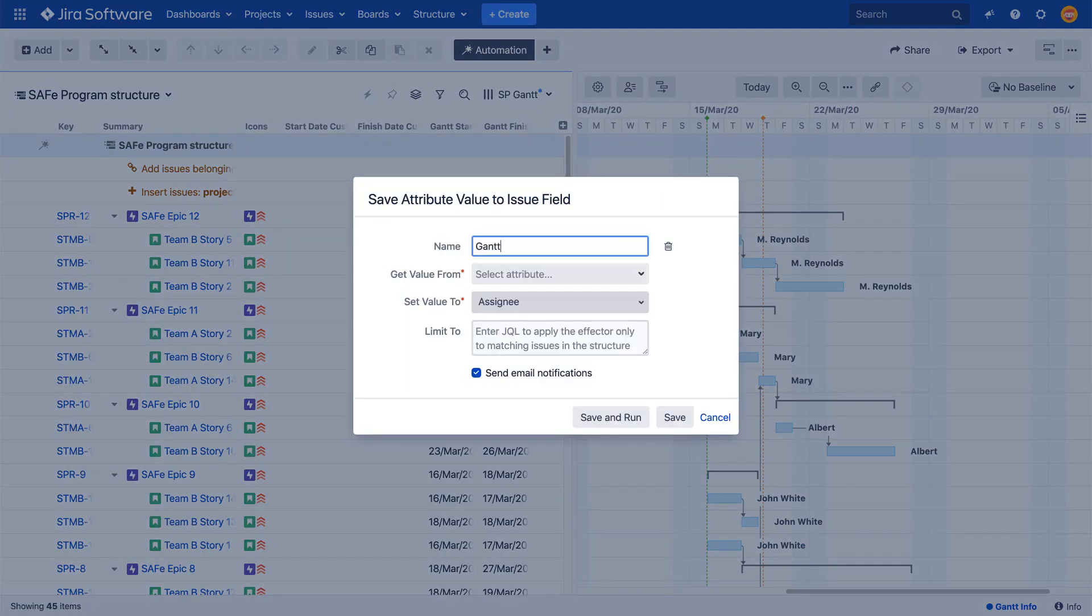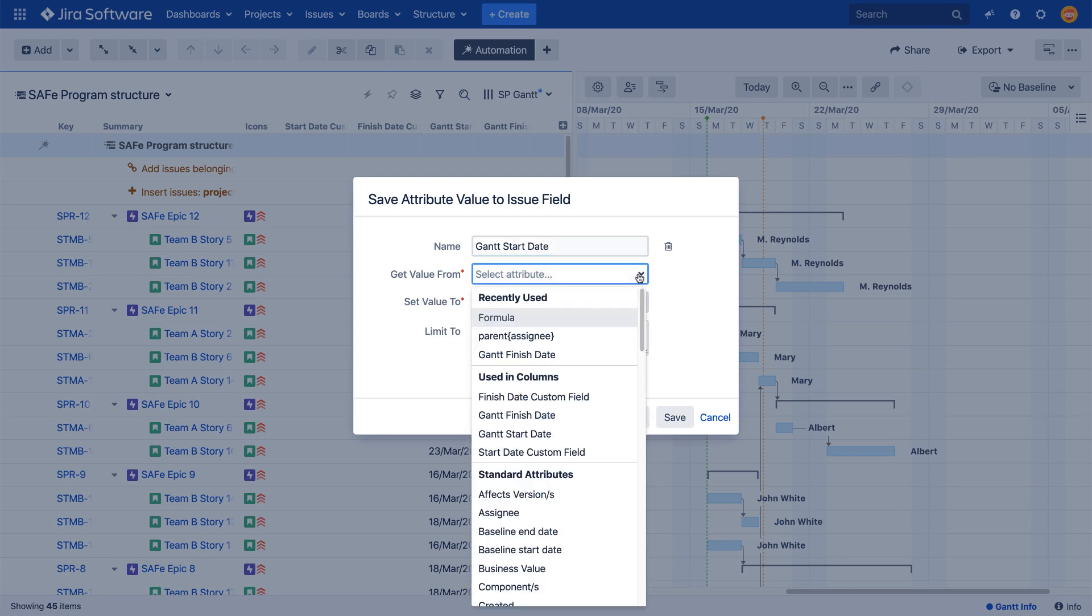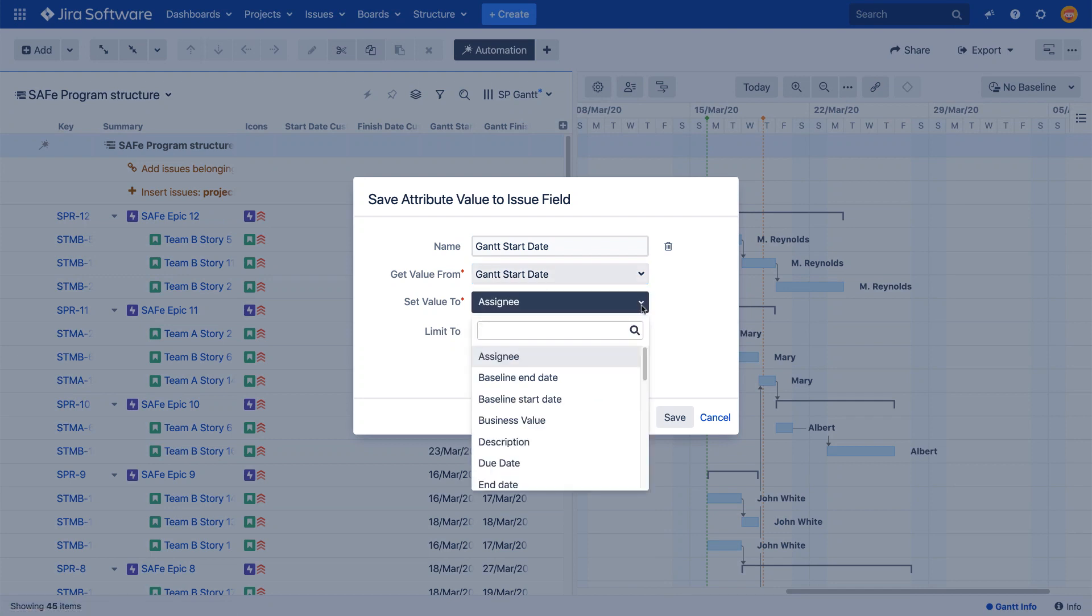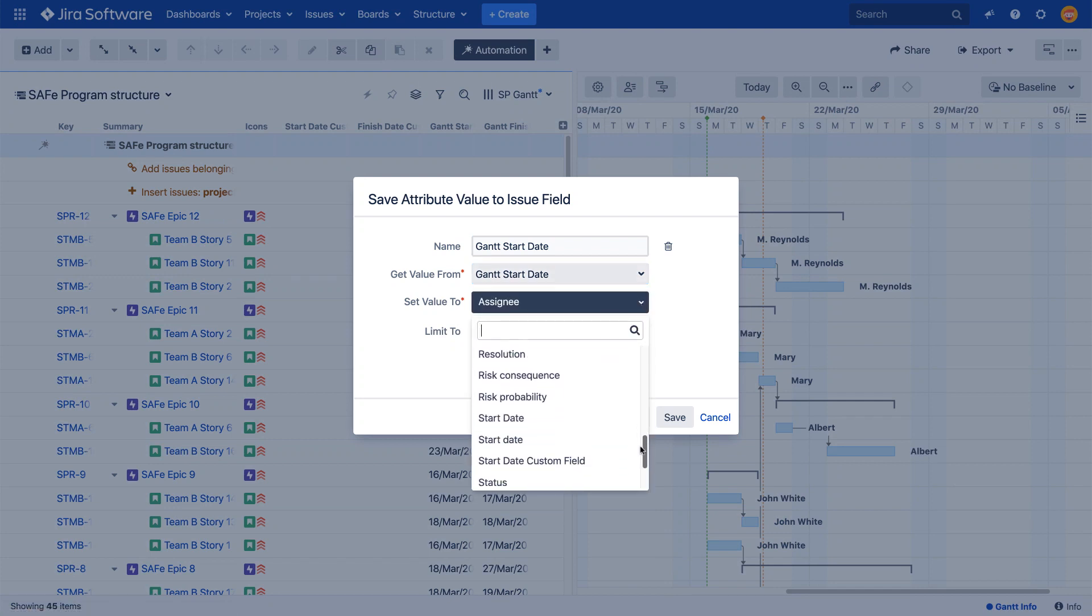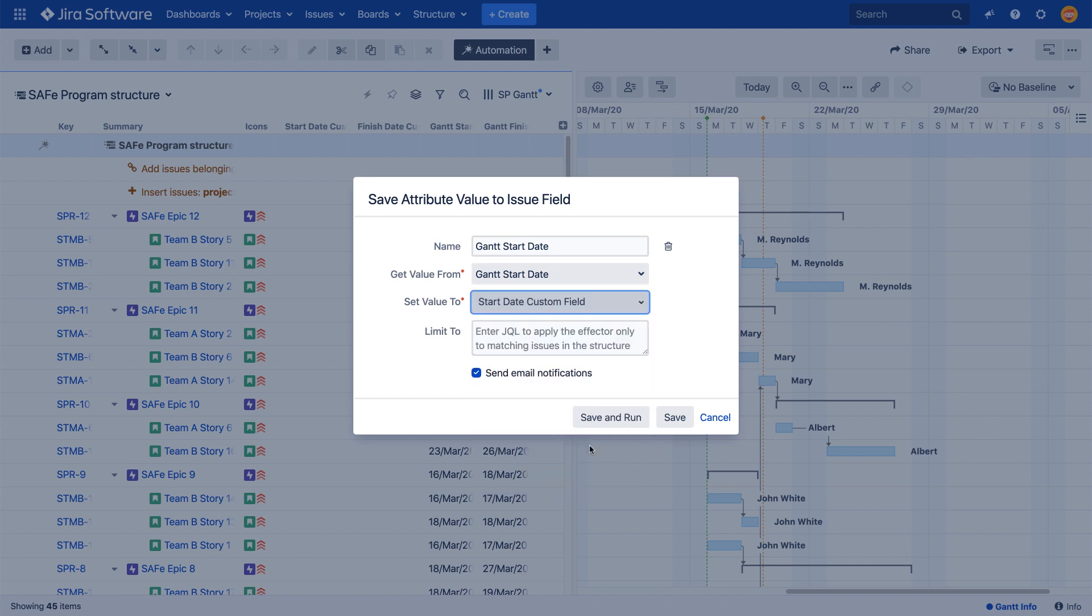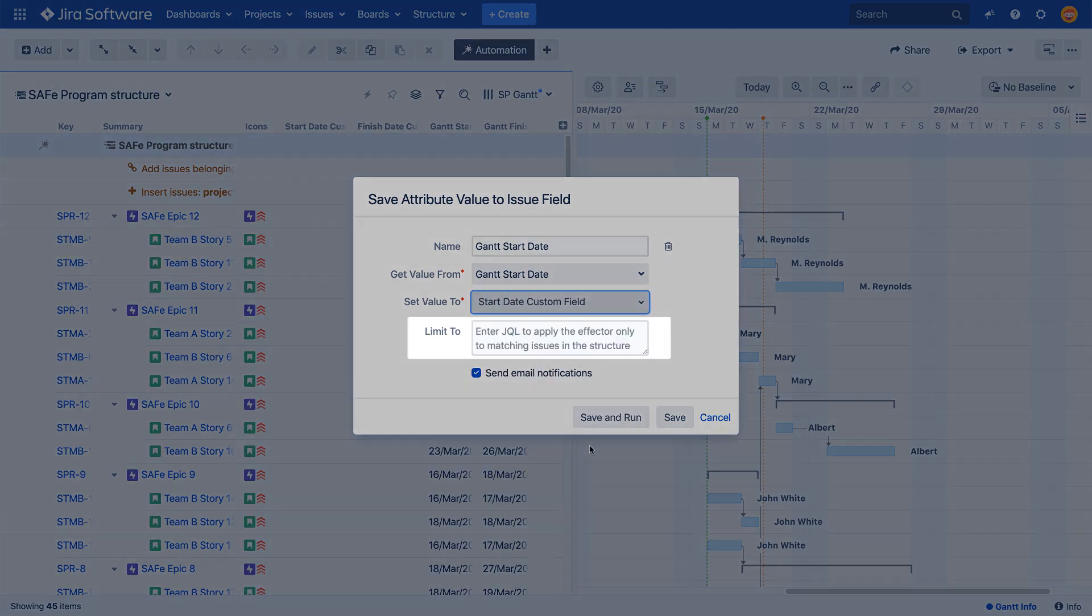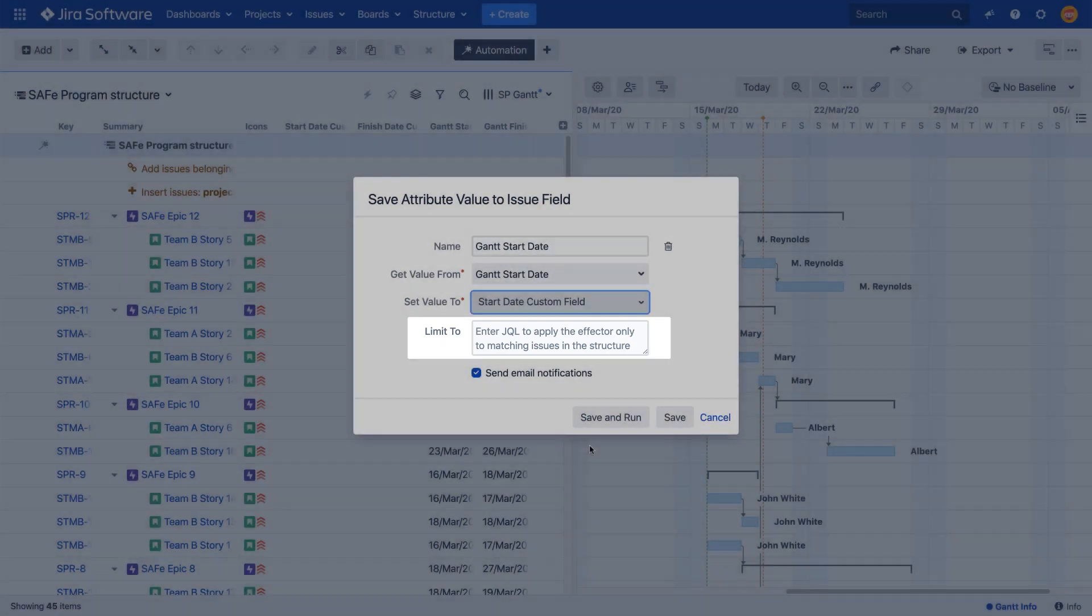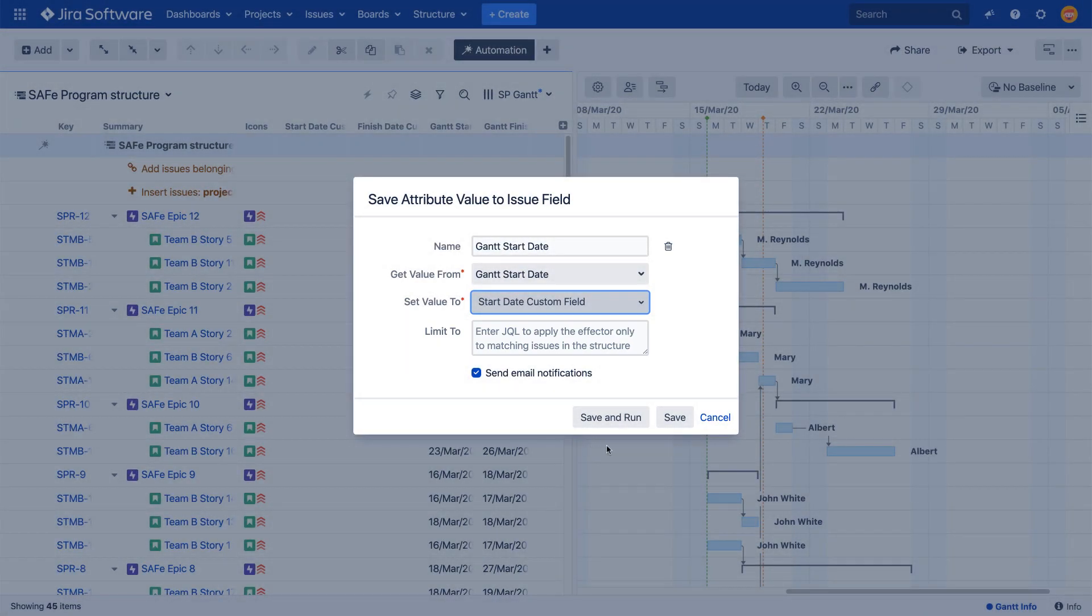In the configuration, I'll need to select the respective Gantt column where our new values will come from and then select which Jira field those values should be written to. The JQL query section can be ignored since I don't need to limit the scope of affected issues for this effector.